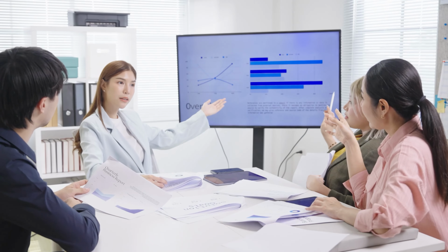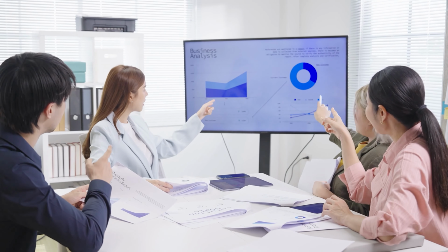As I mentioned before, our QA starts not when the task is considerably done, but when we write our ticket. When we write our ticket, we want to write the motivation, the acceptance criteria, and also the description. And if we are willing to bring our product to real success, we most probably are going to write the test cases, like a testing scenario, for how the developers are going to verify that the feature is complete. So you are a very happy engineer if you work in an environment where your product owner, business analyst, or whoever in the team writes the ticket with acceptance criteria and testing cases. You solve the puzzle, you are in the top 98%.